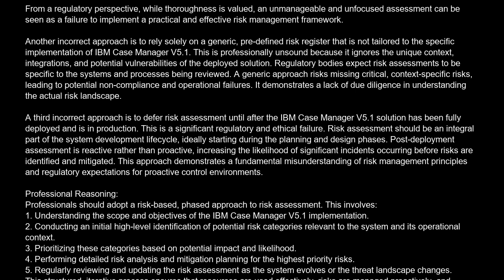A third incorrect approach is to defer risk assessment until after the IBM Case Manager v5.1 solution has been fully deployed and is in production. This is a significant regulatory and ethical failure. Risk assessment should be an integral part of the system development lifecycle, ideally starting during the planning and design phases. Post-deployment assessment is reactive rather than proactive, increasing the likelihood of significant incidents occurring before risks are identified and mitigated. This approach demonstrates a fundamental misunderstanding of risk management principles and regulatory expectations for proactive control environments. Professional reasoning.